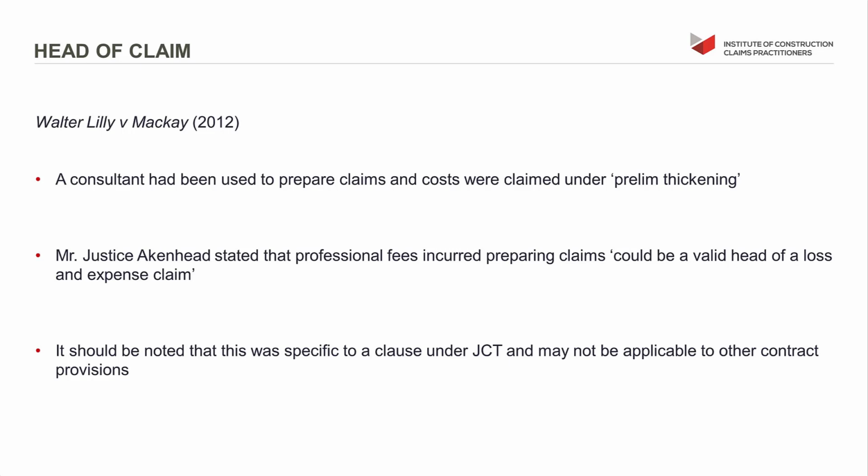So if you've compiled your claim, you've had it rejected by your client, you've decided to take it further and invoke the dispute resolution clause. By the time that process is through, if you're successful and you're awarded costs, it is possible that you can be awarded the costs for your claim submission. Now, there are a couple of provisos here. The main one being that you can't change the content of your claim substantially.